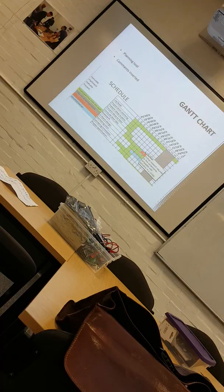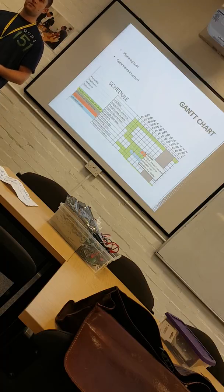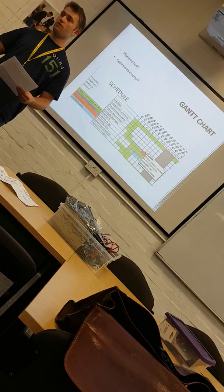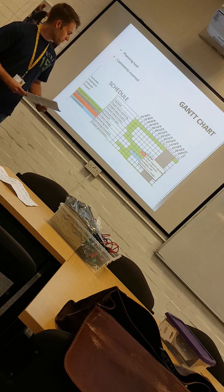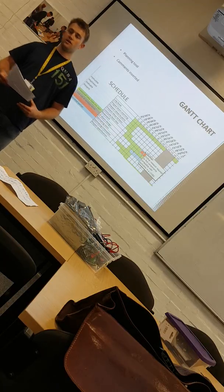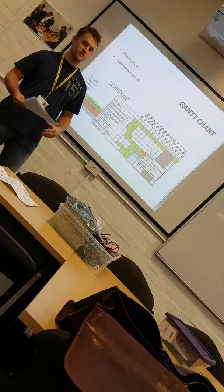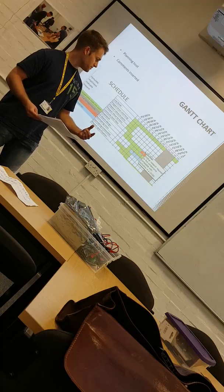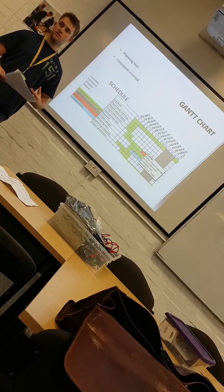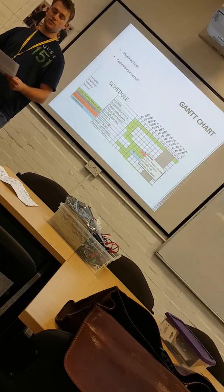I also used a Gantt chart, and this has been an effective tool for helping me to plan my project out. It has also given me a really quick and easy way to understand where I am with the project throughout the whole process. It allows me to quickly view where things have overrun or where I've taken less time to complete a task. In the red we can see a section here as part of my research which extended further into the project, and this time I've had to carry out more research to find compatible components with the circuit. Part of that was the pressure switch and how the actual alarm triggered. It's not been an issue, and I feel that I've caught up because I used less time than initially estimated in my estimating cost stage. So the project continued to move on through.